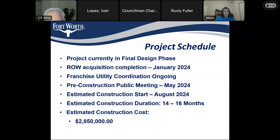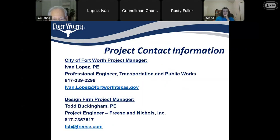And so once the design is complete, we will have another pre-construction public meeting sometime in May, right before construction starts. We do anticipate construction starting sometime in August of next year, 2024. And then the project duration, we do anticipate being about 14 to 16 months. And this project does have a construction cost of about $2.85 million.